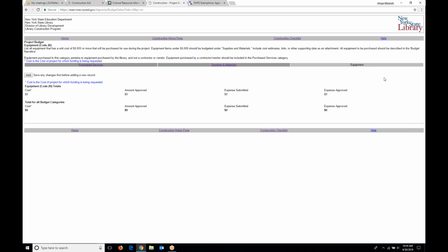Same deal equipment. If you've contracted with an excavation company, they're handling the rental of the equipment, not you. It's under their insurance. They're doing the work, and you're paying them, even though they've called out equipment rental on their bid, they're the ones renting the equipment.